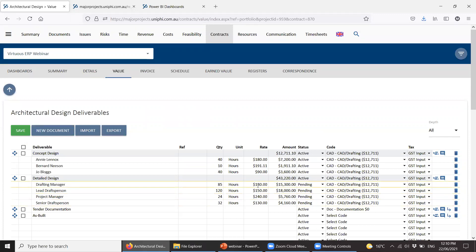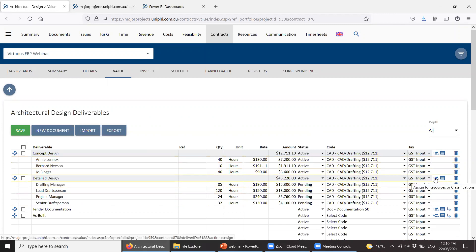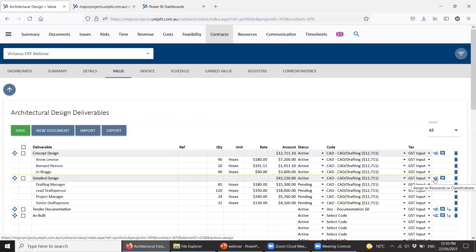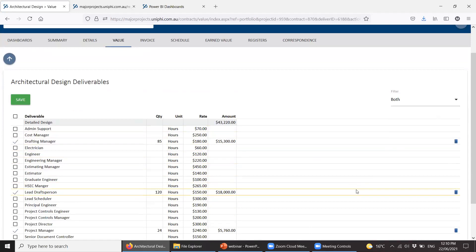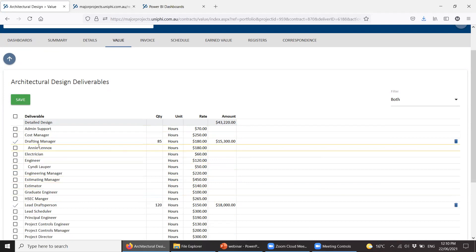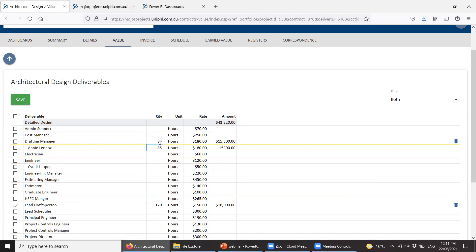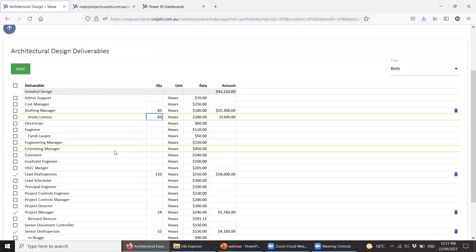Post-contract you might want to put people onto those roles. People who are Drafting Manager — like Annie — would be able to timesheet to Detailed Design even without being explicitly allocated, because she's in that classification. However, it's been pointed out that standard classification rates can differ quite dramatically from actual rates, so post-contract you may want to reallocate. You click the person icon on the right, untick Drafting Manager, and type 85 hours — or split across different people, keeping some unassigned if needed.